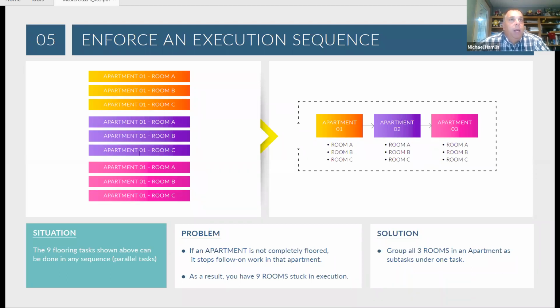This can even be in terms of when I'm doing my glazing, putting all my glass in construction, right? If I'm not focused on sealing up an entire area, then I can't bring other things in to finish up inside. So there's many opportunities where driving this sequence in a construction project can help reduce the overall cycle time of the project.